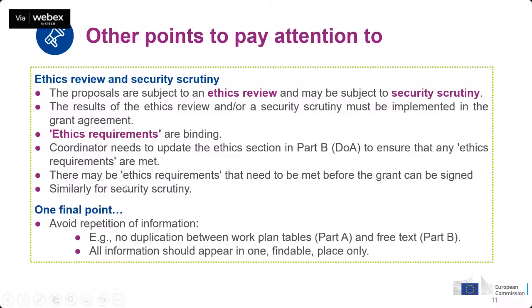You also need to be careful because there might be ethics requirements that need to be met before the grant can be signed. So the project officer will inform you whether this is the case, and if this is the case, until this requirement is fulfilled, you will not be able to sign the grant. And similarly for security scrutiny.